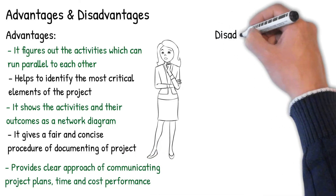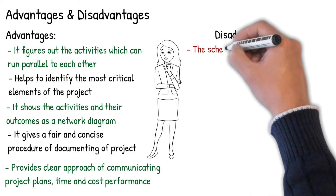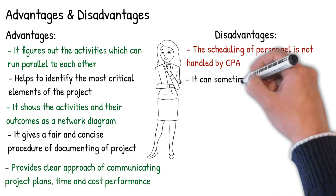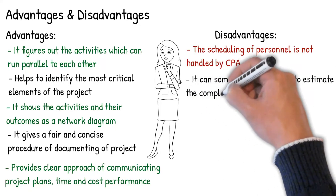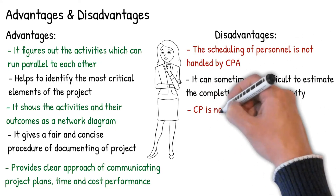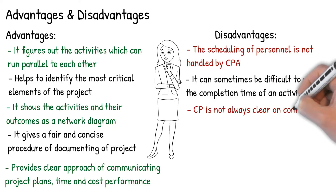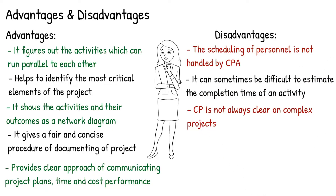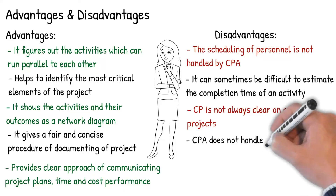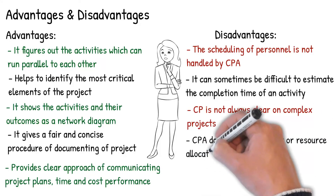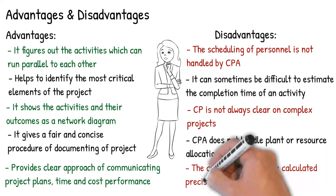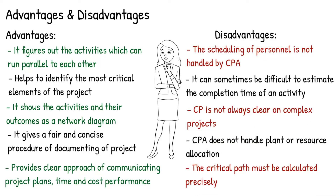Disadvantages: The scheduling of personnel is not handled by the critical path analysis. In CPA, it can sometimes be difficult to estimate the completion time of an activity. For extremely complex and large projects, the critical path may not always be clear. It does not handle the scheduling of the plant or resource allocation. And for CPA to be an effective and useful tool to project managers and quantity surveyors, the critical path must be calculated precisely.